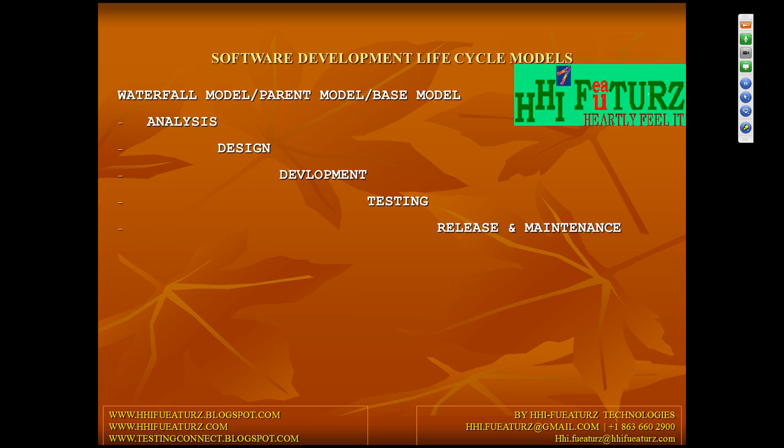Then the development team refers to these design documents, and for their development activities, they divide the entire application into different modules, into submodules, into sub-submodules. They take the smallest independent component and start by developing that, then slowly integrate and enhance until the entire application comes together. So that's how they develop.